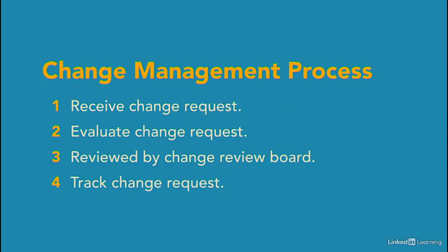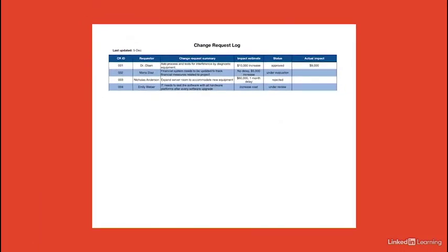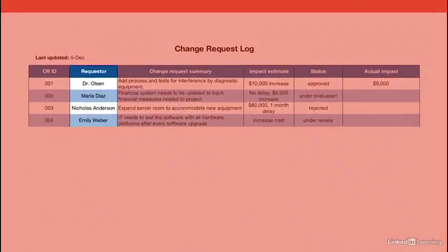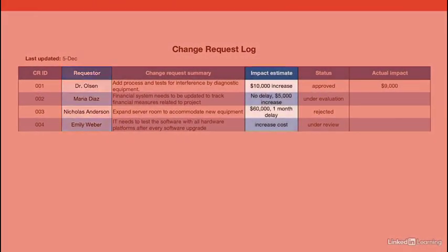Finally, track where change requests are in your process. A change request log shows the status of submitted change requests, who's in charge of the request, the impact estimate, current status, and at the end, actual impact.